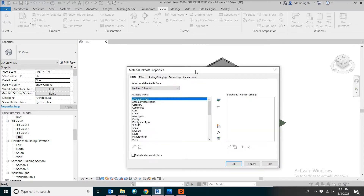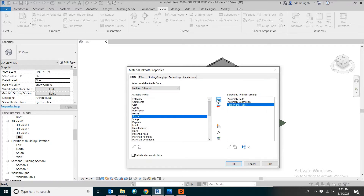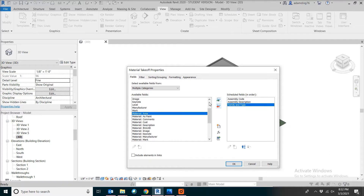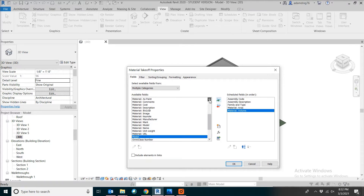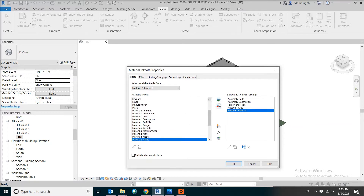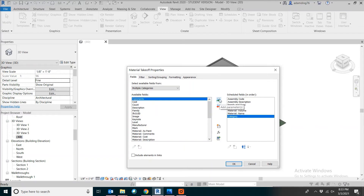Now pick the fields we need. You can pick Assembly Code, Assembly Description, and Family and Type. Those are the things that we usually pick for a schedule. You can also add a few things related to the material, like Material Area, Material Volume, and Material Name. Finally, add one more for the category.